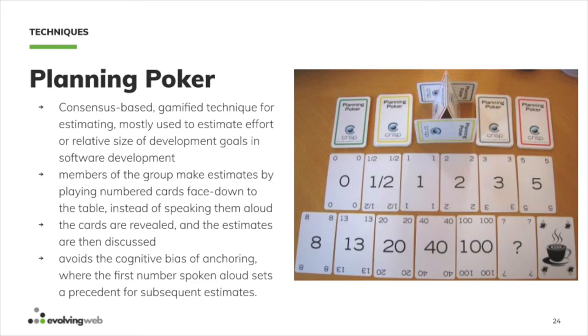And so the idea here is that the estimation group reaches a consensus using these cards, and then you take another vote again until everybody tends to agree: is it going to be more towards a 3, or a 5, or the 13? The advantage of not showing your cards is that you don't bias anybody, because if the first person to show their card influences you, you might change your estimate based on that. So that's just very quickly to talk about planning poker.